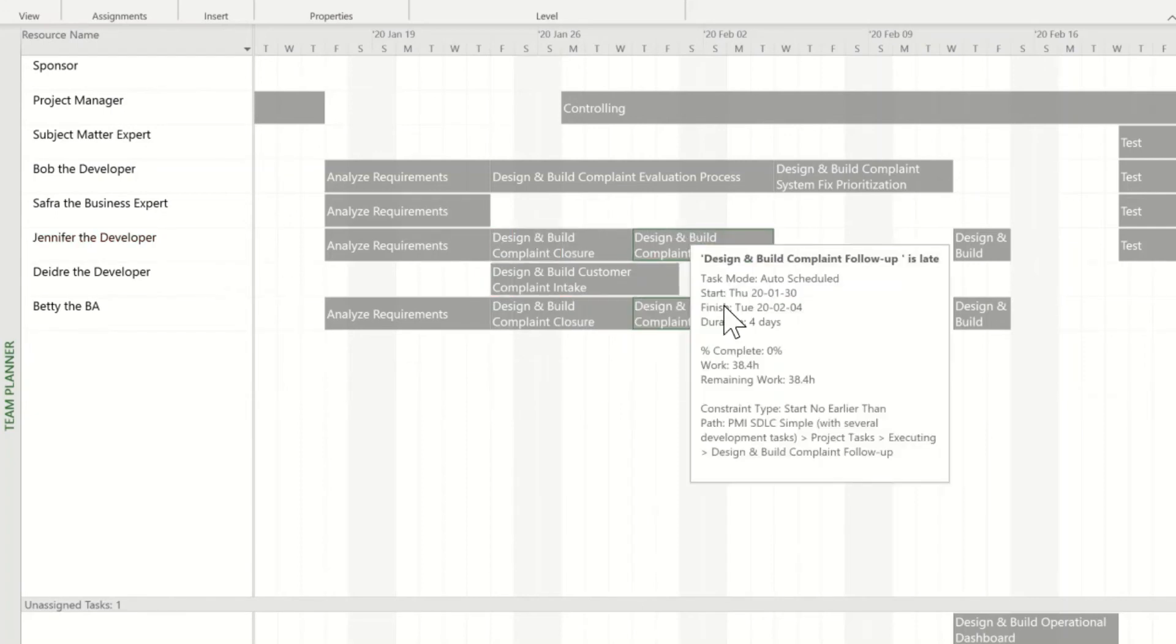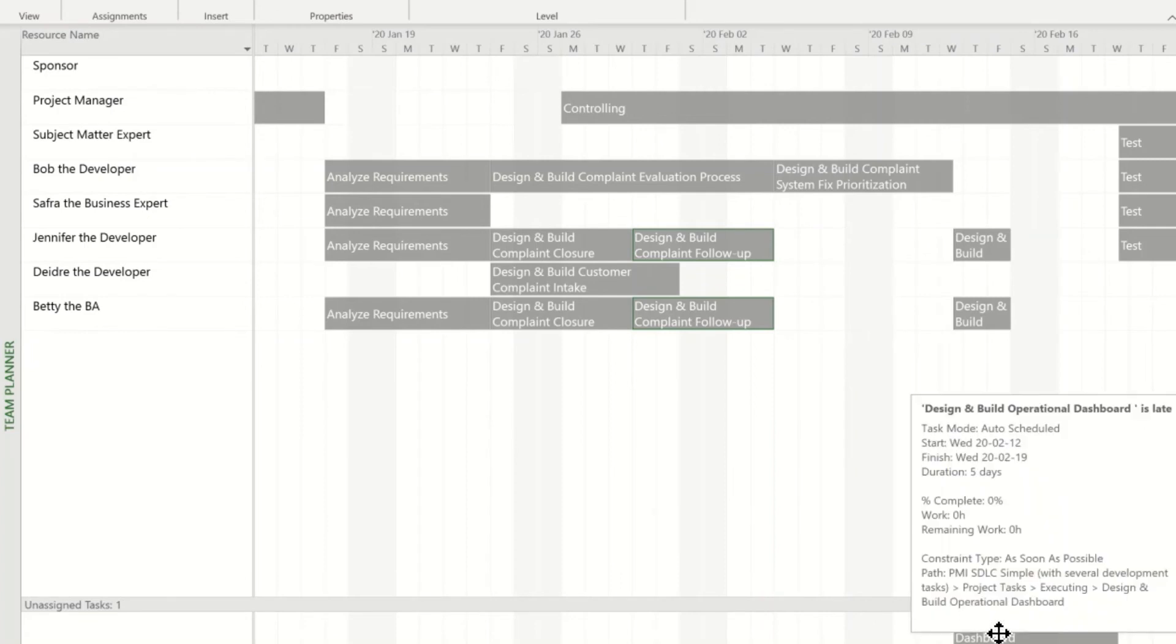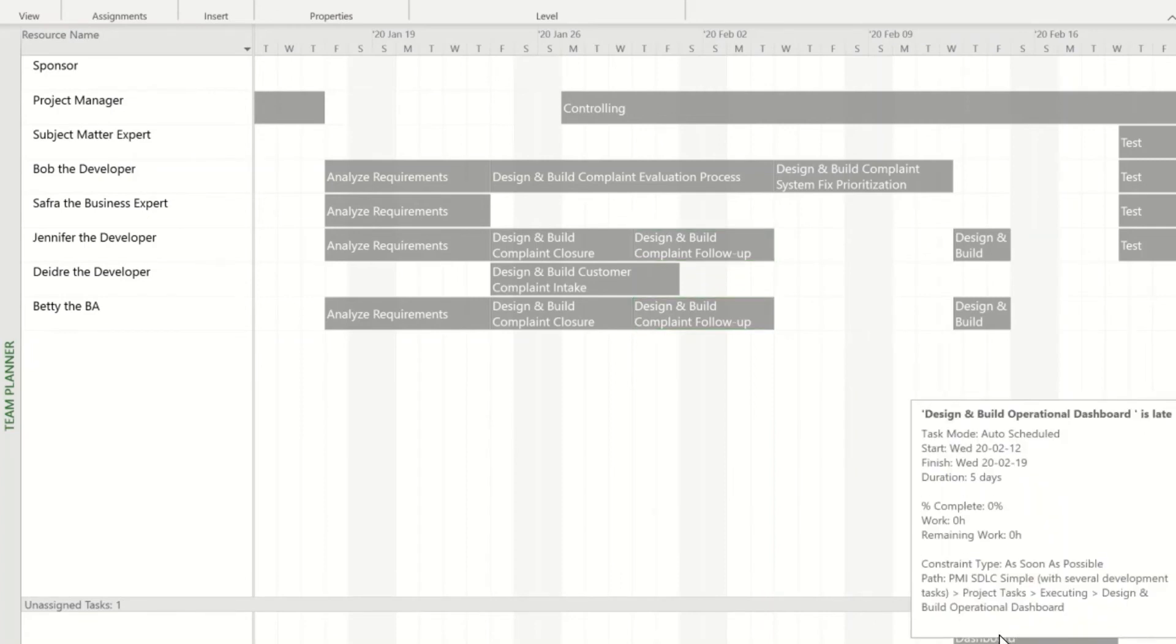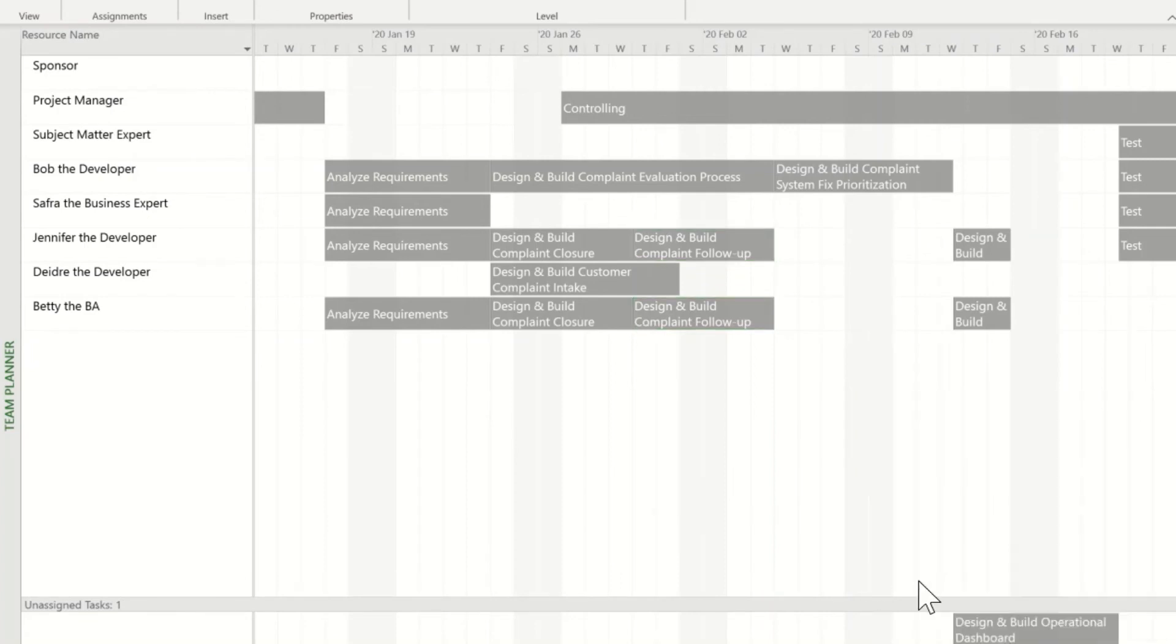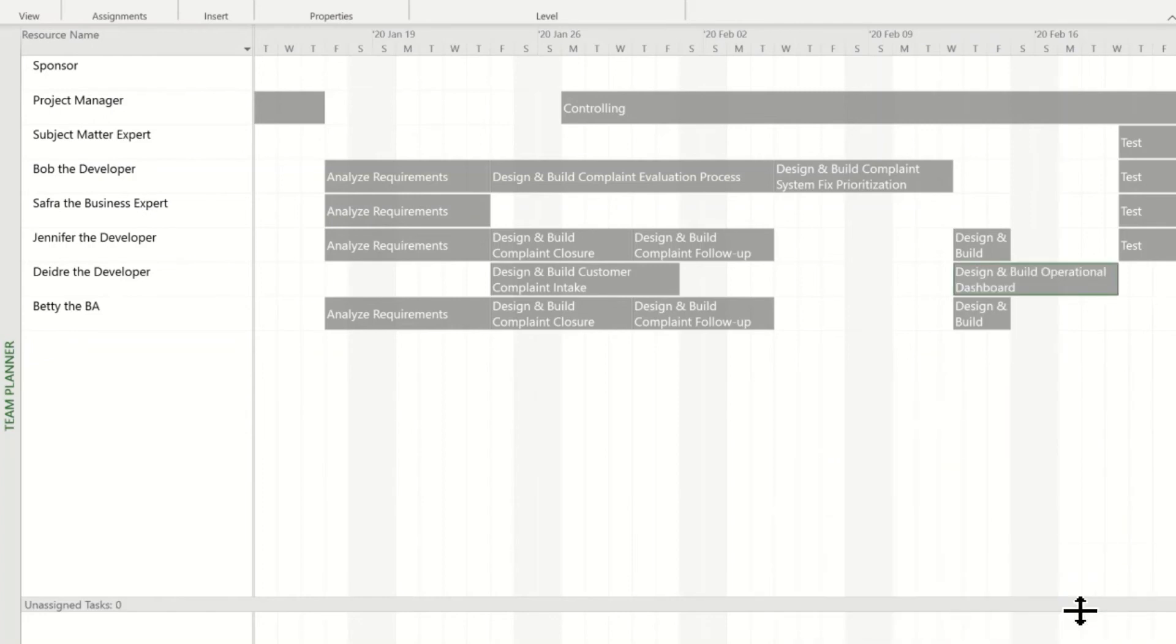I have one more thing to do and that's to deal with this unassigned activity down here. I'm going to give this one to Deidre simply by right clicking on it, clicking reassign to and picking Deidre. Now we've got all the over allocations and some under allocations fixed and I've also got all activities assigned.